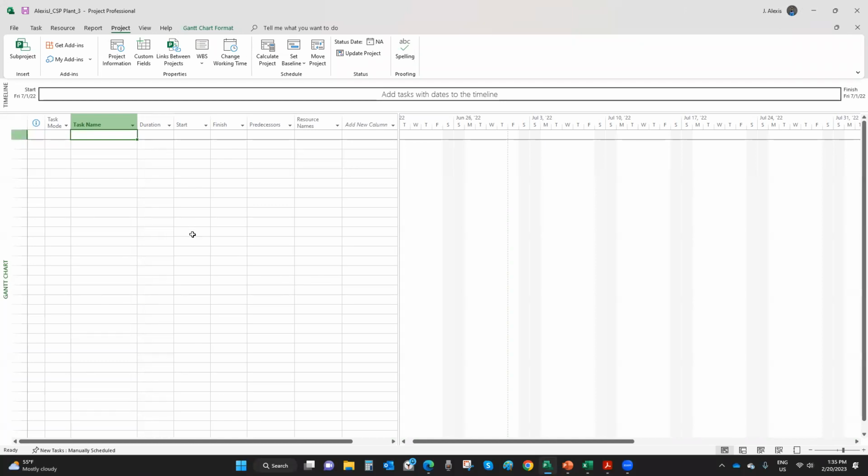So the other thing we did, we entered the start date for the project, because we're going to do what we call forward planning. From the start date, we will start entering data in the software so we can create what we call a performance measurement baseline, right? The baseline, when we have a good plan, we're going to baseline it, and we're going to use it as standard for comparison later when our project is underway during execution, right?